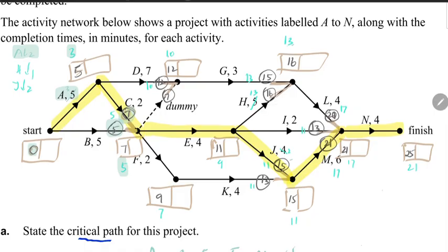So let's now go along the path that cannot be reduced, along D. So the 3 here, plus 7 is 10. Now, because there's 2 edges, we have to come along the other edge as well to make a choice. Now we've changed 7 to 5 as the earliest starting time, the beginning of the dummy, and so that will cause this to change to 5 as well.